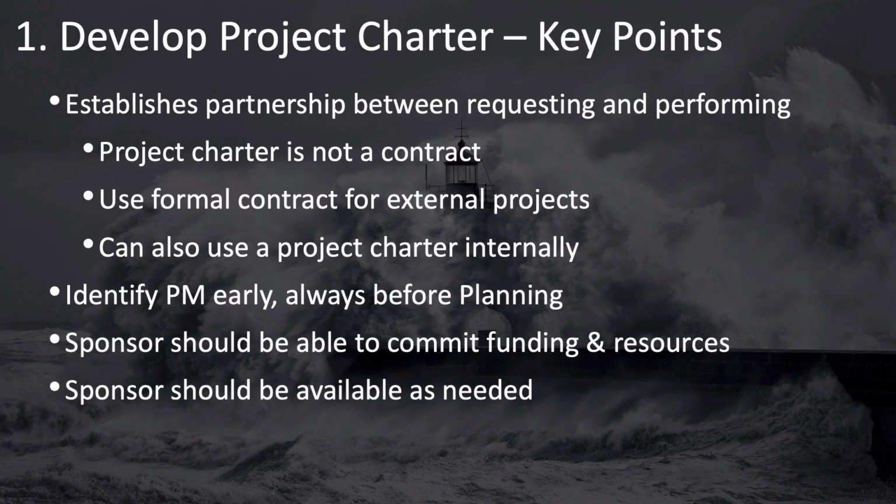Your project sponsor should be someone who is high enough up in the organization that they are able to commit the funding and other resources needed for the project. On the other hand, this sponsor shouldn't be so high up that they become unavailable to you. It's important to be able to escalate as needed to this project sponsor.